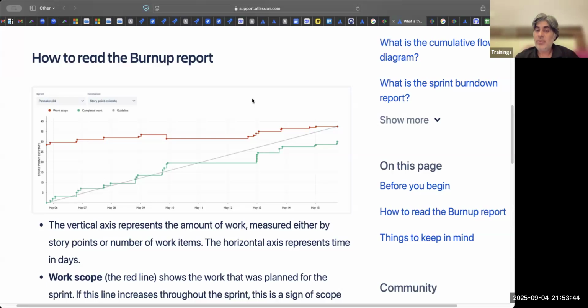That's a big problem. And typically, Scrum Masters can also use this chart to show it to the PO. PO wants to add something. He will say, why did the team not complete anything? Boss, team did not complete anything because on day 5, you added few more stories. On day 8, you added more stories.